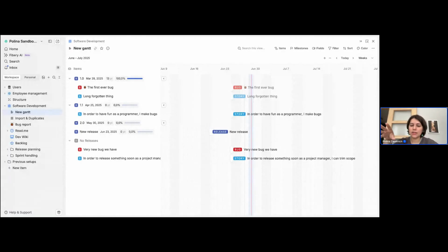So it's handy when you want to control the order of execution better. Gantt view doesn't have any backlog. It shows all entities according to filters. Planning usually is much faster on the Gantt because there you can quickly create new items and plan them on dates with a single click. And since it is a Gantt view, each record always occupies one lane. In timeline that was an optional mode, so you could see the records going one by one, but in a Gantt view, each card has one lane.